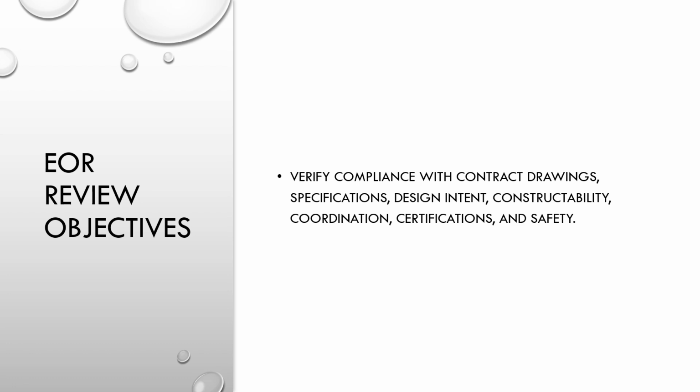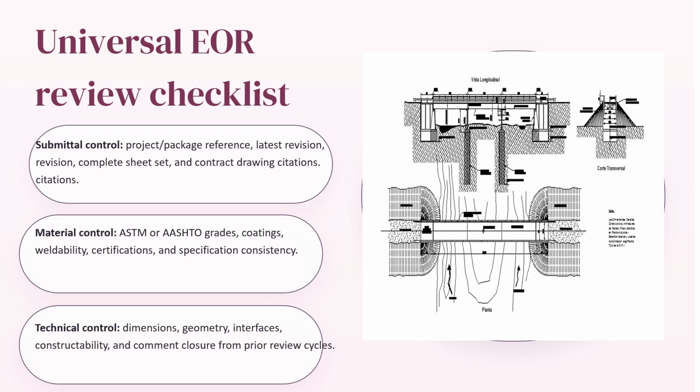Shop drawing acts as a bridge between the design phase and the construction phase. Universal EOR review checklist. Submittal control: package or package reference, latest revision, complete sheet set, and contract drawing citations.